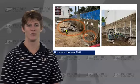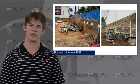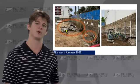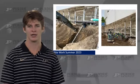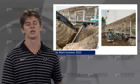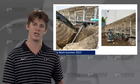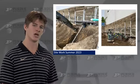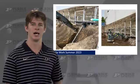And what the excavation and lagging kind of looked like here is we have a mini excavator that's kind of grading the wall, and all that wood is lagging that the guys behind them are putting up. Another form of structural security for the shoring and lagging are these rakers. So you can see that we're digging along another building here. Our tiebacks would go into the parking garage, so we can't do tiebacks. We had to use rakers, which are these horizontal tube steels that are welded to these whalers, which are just horizontal beams.